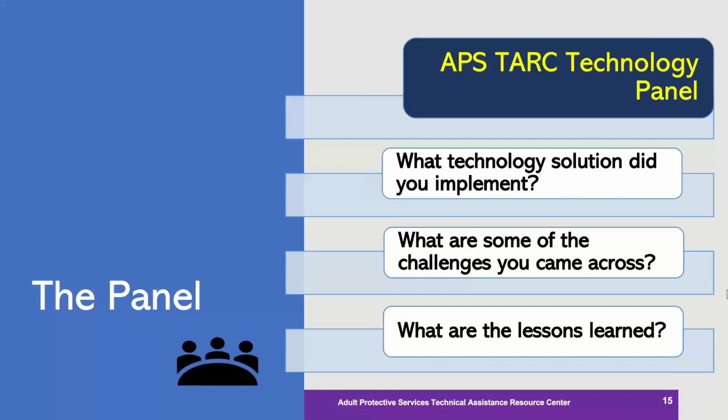Heidi, that's absolutely correct. Just be on the lookout for that, because you need to build in a system to manage all the requests that are going to come in, and those requests have to be filtered. It doesn't mean that every request that comes in will be fulfilled. But the greater picture of these requests needs to be fulfilled, because those pieces are vital, critical to the success of the project. Right, and if time permits or if budget permits, those other additional requests could potentially be revisited.